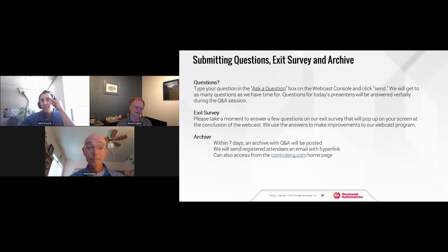Yeah. So I can think of a story of a customer who switched to digital twins when he was supplying a production line. It had 3 elements out of 3 of his different facilities. They were putting their line together. They came on site. All 3 of the machines are being built up, and a couple days before startup is supposed to really go wild, the project manager of the middle machine says to the guy up front, hey, can you put in that last piece of conveyor, please, so we can get the product flowing between these machines? And he turns around and says, that's not in my scope, that's in your scope.